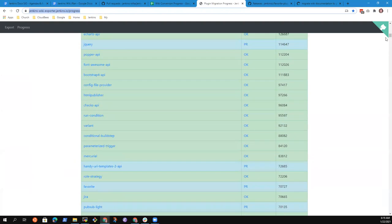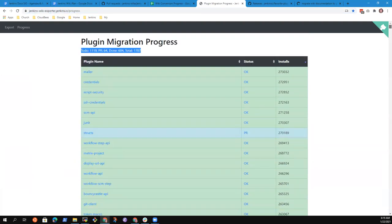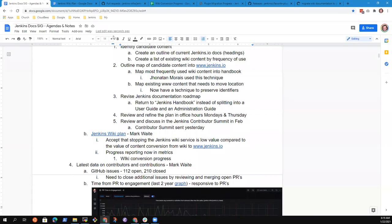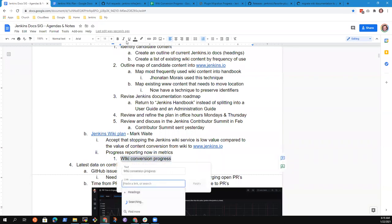And the wiki conversion progress page is here on the Jenkins wiki exporter. And what it shows us is that we have over 1,100 plugins yet to migrate their documentation from wiki to GitHub. 617 of the 1800 total have been migrated. So we've got one third of them that have migrated to documentation as code.